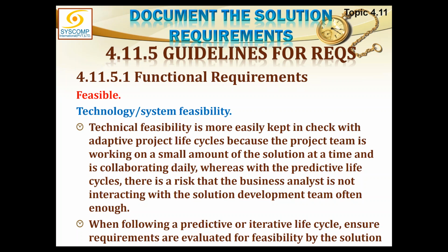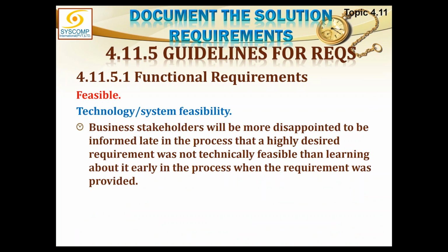Technical feasibility is more easily kept in check with adaptive project lifecycles because the project team is working on a small amount of the solution at a time and is collaborating daily, whereas with the predictive lifecycle, there is a risk that the business analyst is not interacting with the solution development team often enough. When following a predictive or iterative life cycle, ensure requirements are evaluated for feasibility by the solution development team before they are baselined.